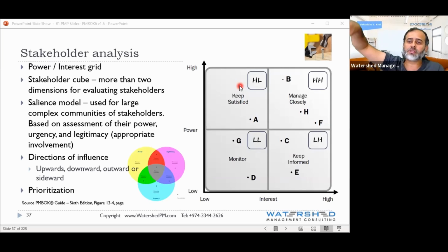So in terms of importance, high for you are your most important stakeholders. Second most important stakeholders, high power, low interest. Third most important, or maybe equal to that, is low power, high interest, maybe slightly less. And even the lowest important for you is low. They're still stakeholders, still important, but lowest. Low. Okay. Mazboot? Clear. All right.